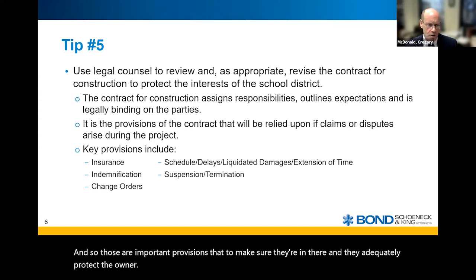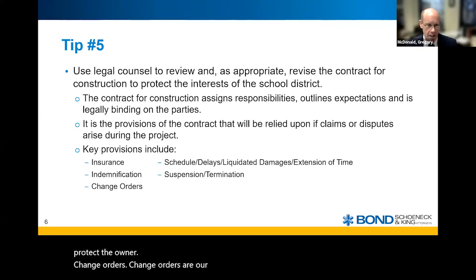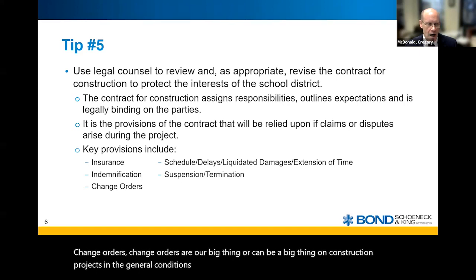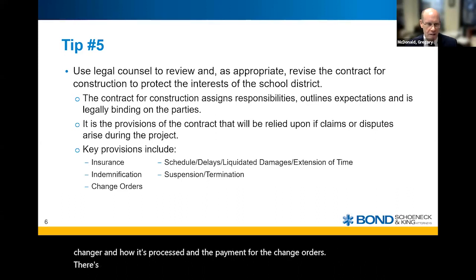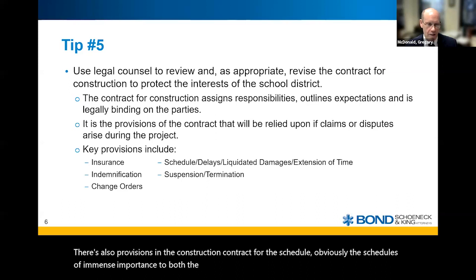Change orders are a big thing, or can be a big thing, on construction projects. The general conditions can outline that process: what's entitled to a change order, how it's processed, and the payment for change orders. There are also provisions in the construction contract for the schedule. Obviously, the schedule is of immense importance to both the owner and the contractor, because the longer it takes, the more money it costs.